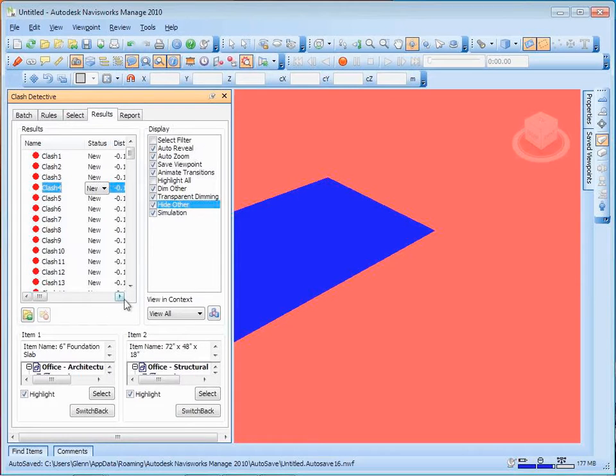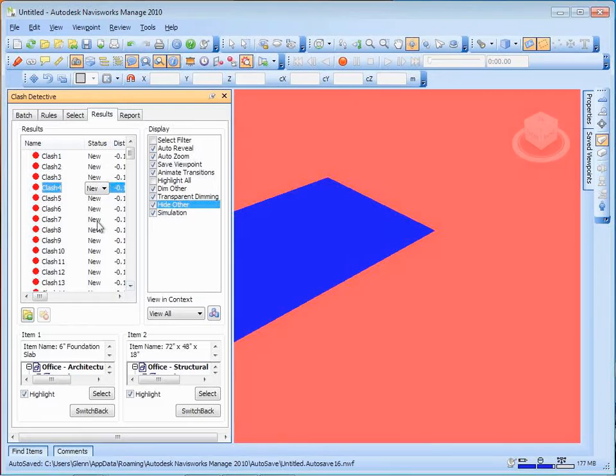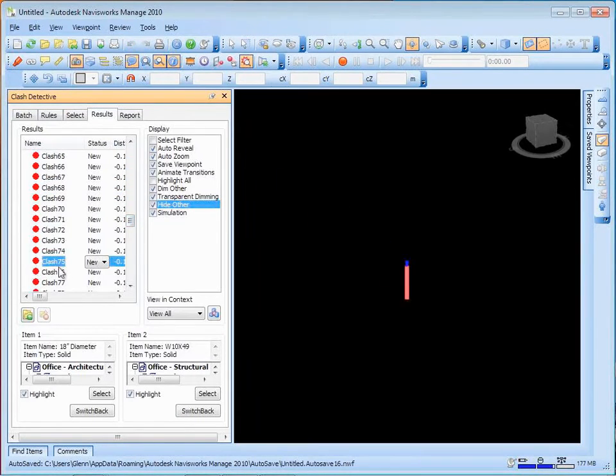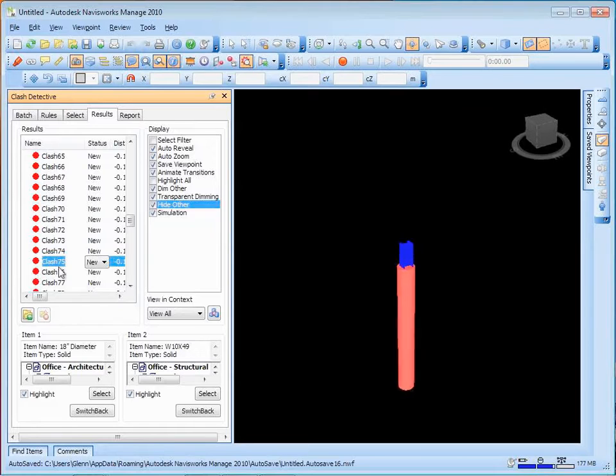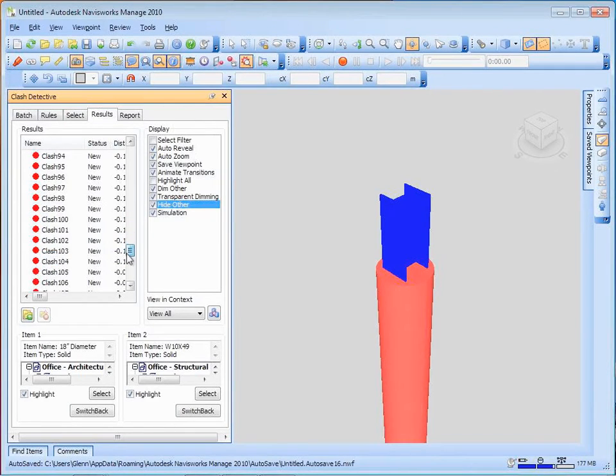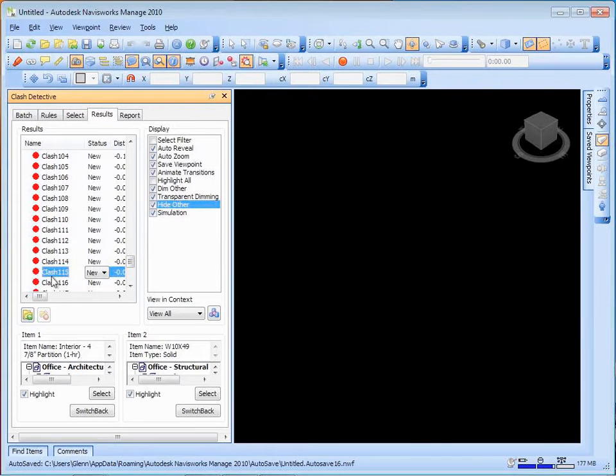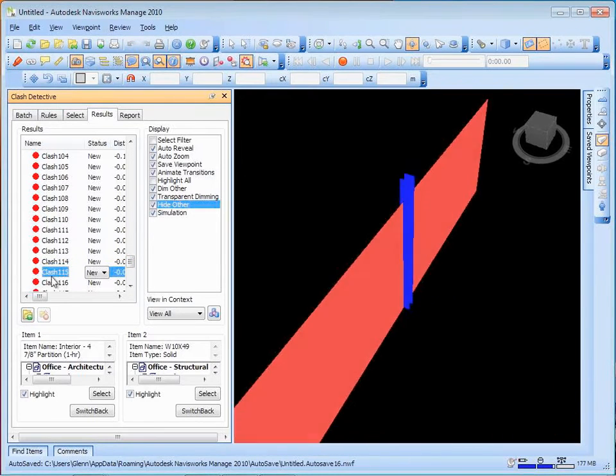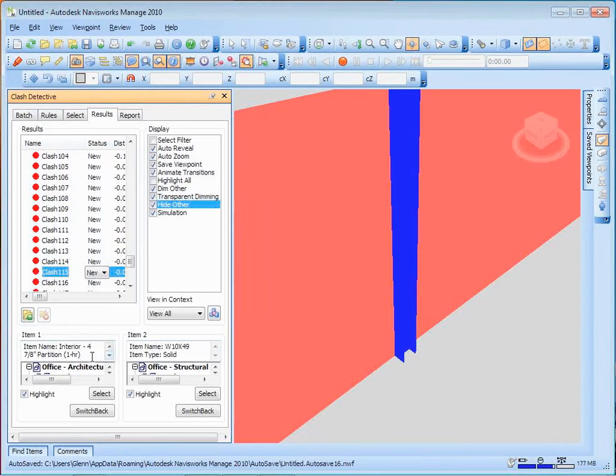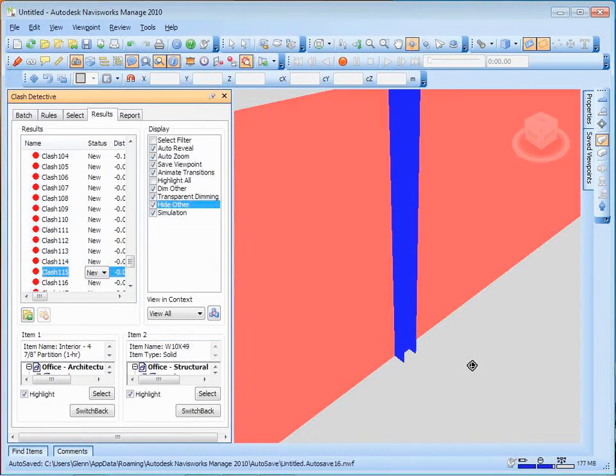Now, that's something where you may decide that's actually A-OK, so we don't really care to go through and change that. Let's go pop it on down a little further. Here we have some round columns, the architectural columns intersecting with the structural columns. What's this one? This looks like it's a W 10 by 49 with an interior partition wall.